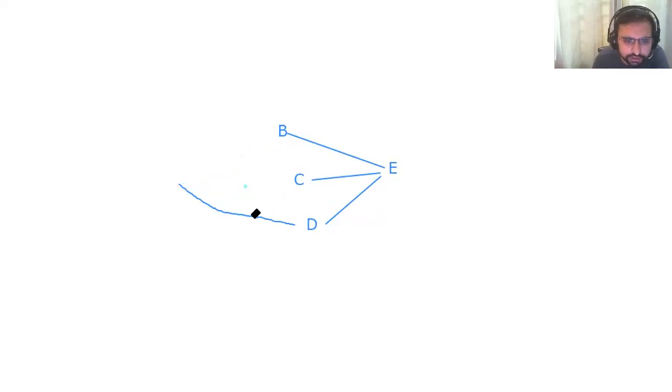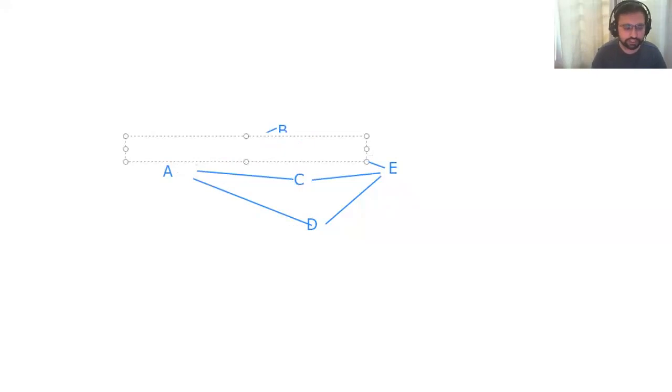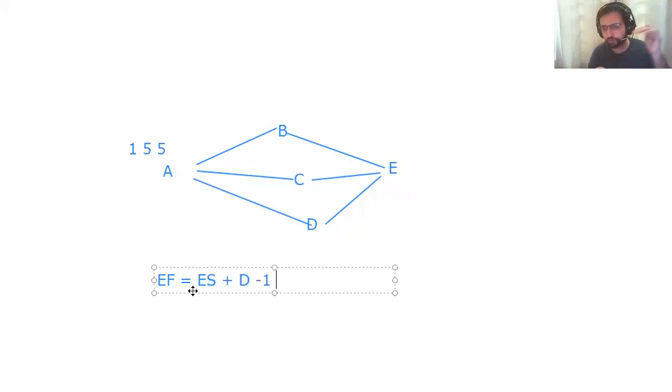We have made the critical path. It does not look beautiful to me, so I'm going to erase this and use straight lines. Comparatively better. Activity A. So now the duration of A was five. And we know that the first activity starts on day one. Duration is five. The formula for early finish is equal to early start plus duration minus one. And you're moving forward first.